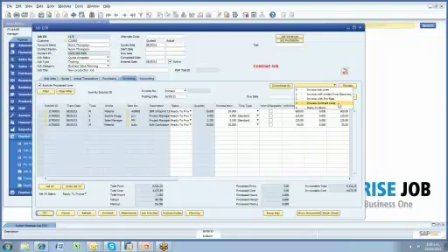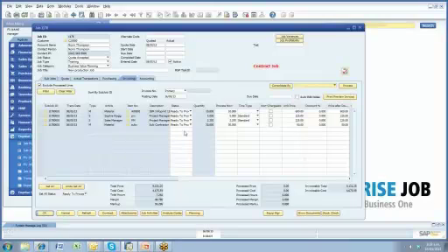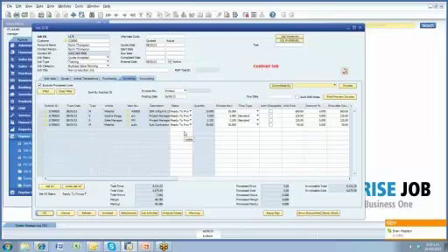There is this option, process the contract lines. So I've already invoiced, and now I'm processing the lines, and that will clear out that deferred revenue and put that from my balance sheet into my income statement under revenue. But I can also force it so that I can only invoice from those contracts, or I can also allow change variations, etc., to be invoiced separately as well. So I've got a whole bunch of options here.